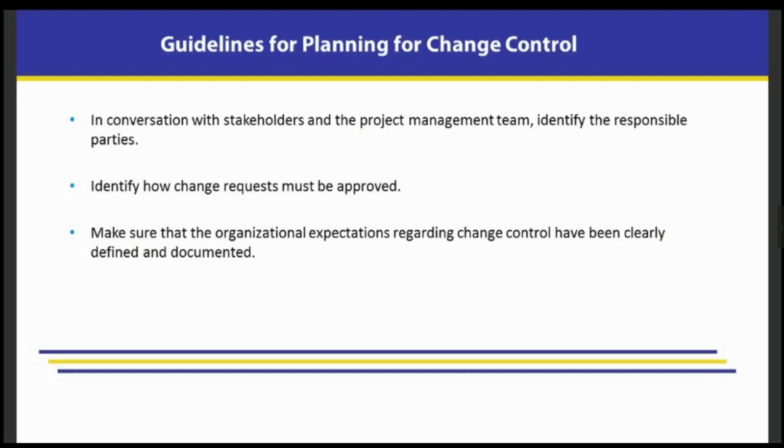That's right. And then once they were approved, how do we integrate that going forward into our project plan? So then there might need to be a little planning session associated with those new requirements and how we're going to accomplish that along with the current schedule. Okay. So those are some different things that we would want to know about change control.